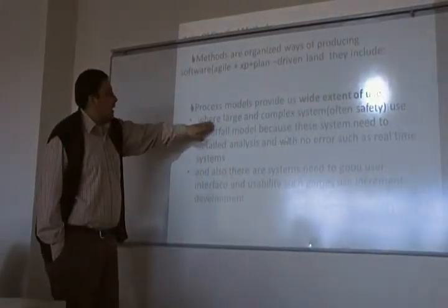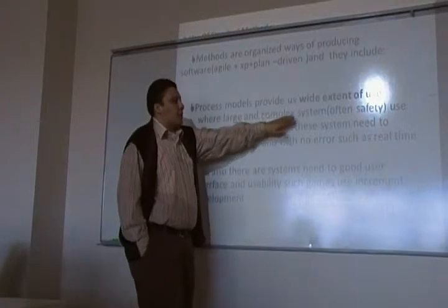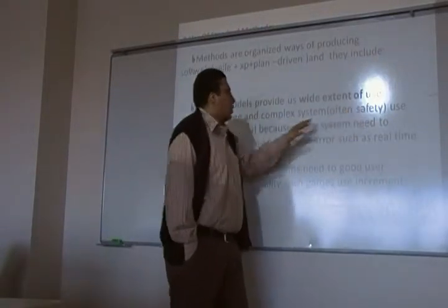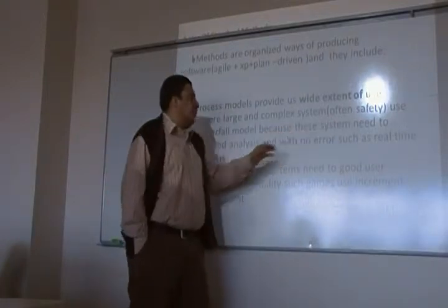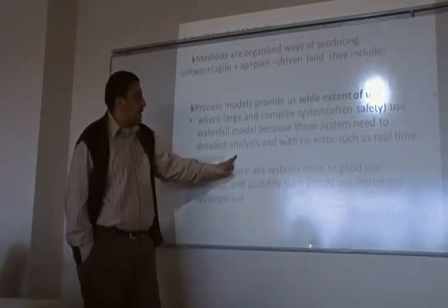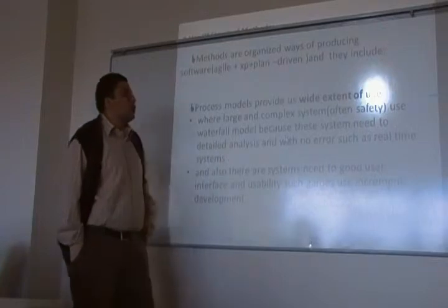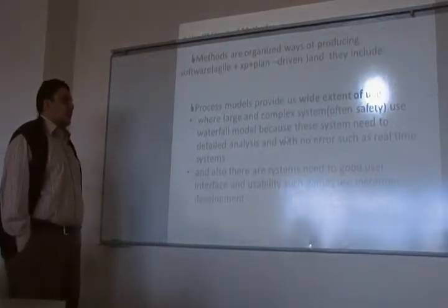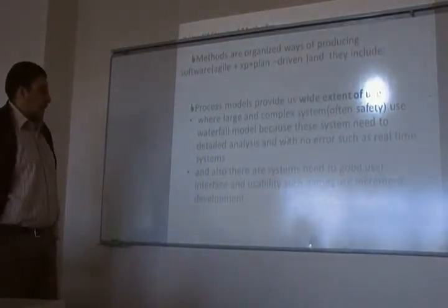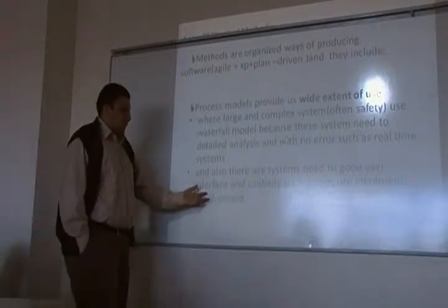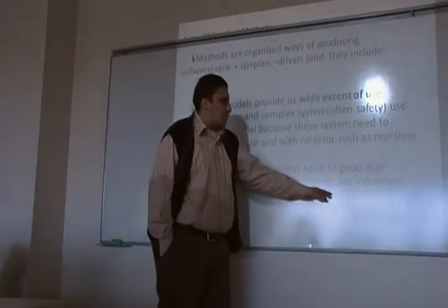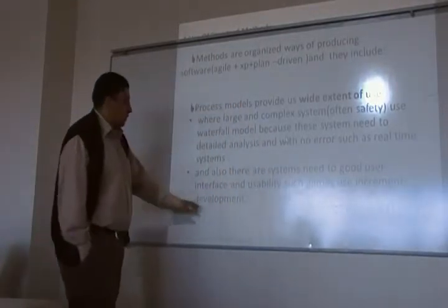Some large and complex systems, often safety systems, use the waterfall method because they need detailed analysis and no errors, such as real-time systems. There are also systems that need a good user interface and usability, such as games, which use incremental development.